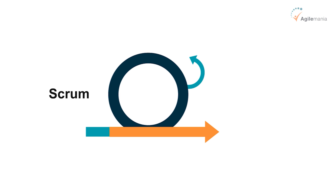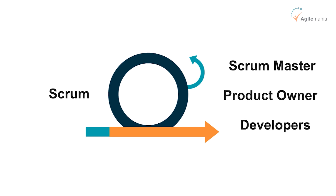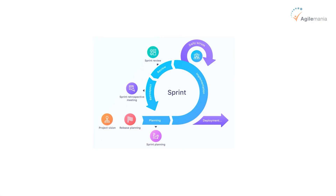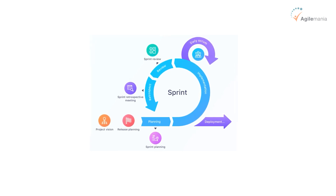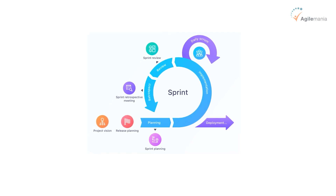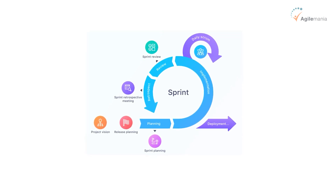In Scrum, you have three roles: a Scrum Master, a Product Owner, and developers. It's based on empiricism, which means you learn from your experience. It has three pillars: inspection, adaptation, and transparency. And then you have a sprint — a container for different ceremonies or events, which are: daily Scrum, sprint planning, sprint reviews, sprint retrospectives, and backlog refinement, which gives you the product backlog and so forth.